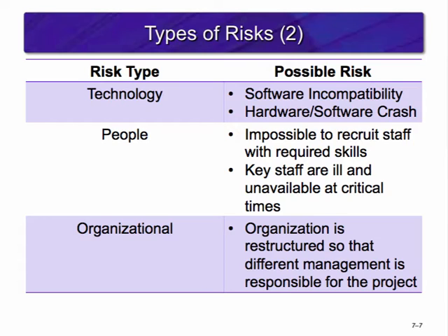People are also at risk. If you need to hire for a specialized position, you may have difficulty finding someone with the necessary skills. This could delay your schedule, increase your costs, or even kill the project. Or your staff might become sick at a critical time in the project, setting the project back.